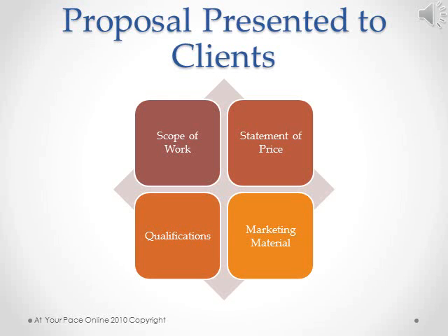So your proposal needs to be clear and concise. Include quantity, quality, type, and any other pertinent details which will depend on the type of project. This is where you're going to inform the customer how and when they will pay. It's also good practice to let them know for how long the price is good for.